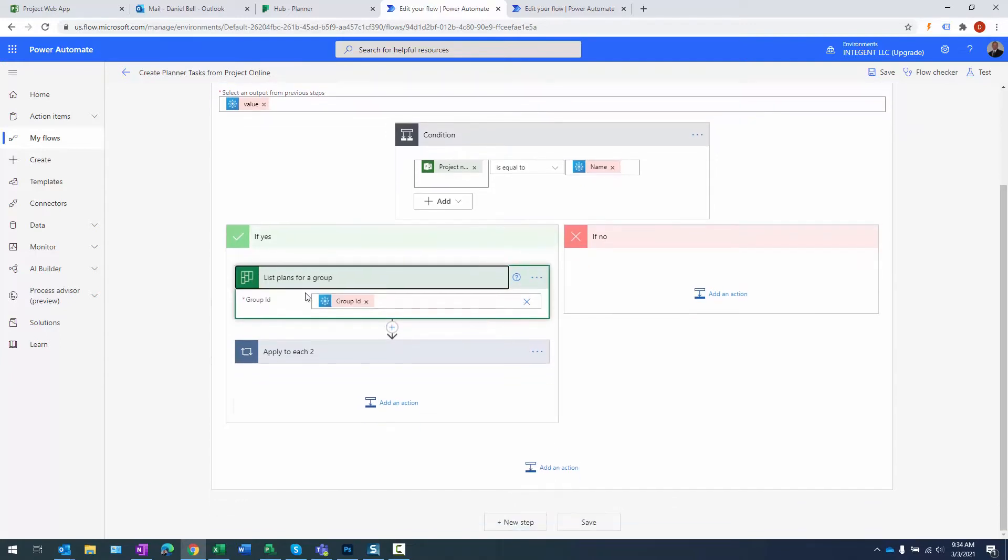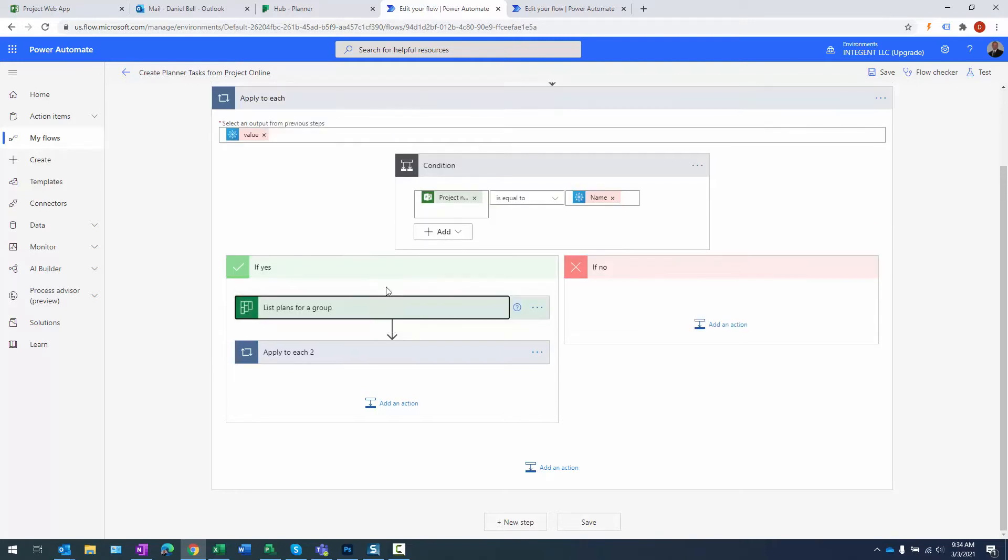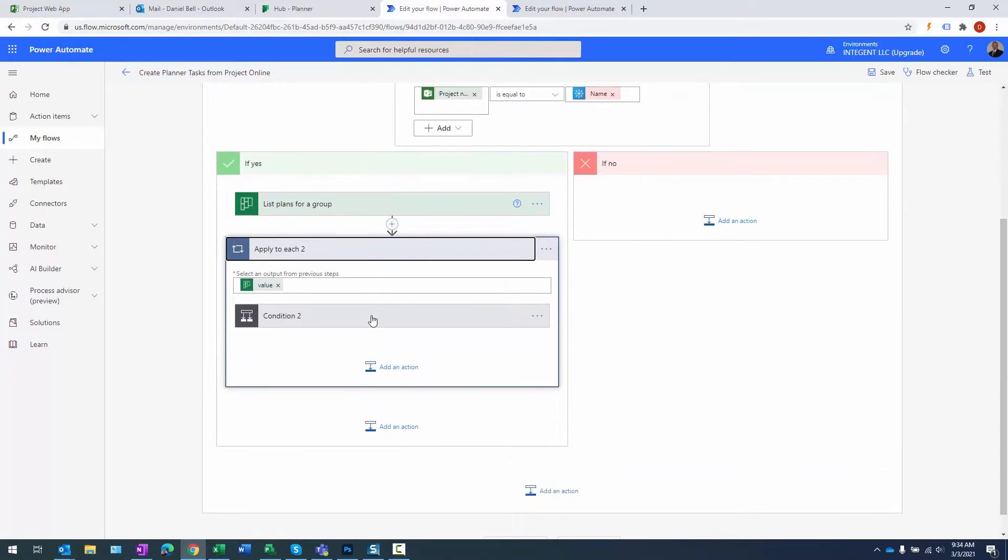When that happens, I take that group and I use it in a planner action, and it lists the plans for the group. The reason I'm listing the plans is because there can be multiple plans for a single group if you want to use an existing group. And number two, I need to get the ID of the plan in order to add tasks to it. So I take that value and then I'm going to iterate through them.